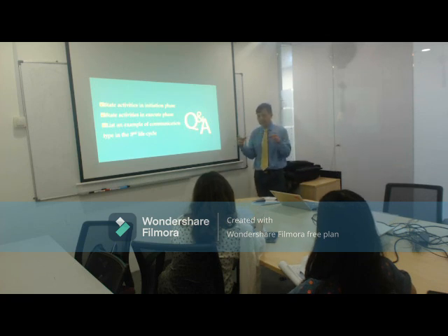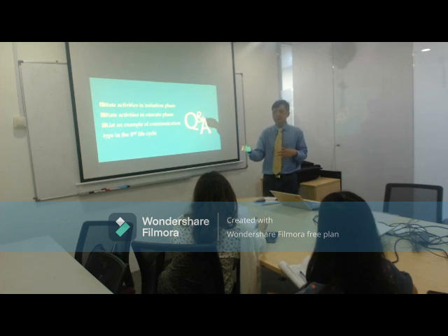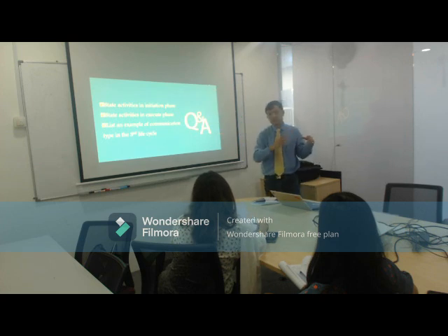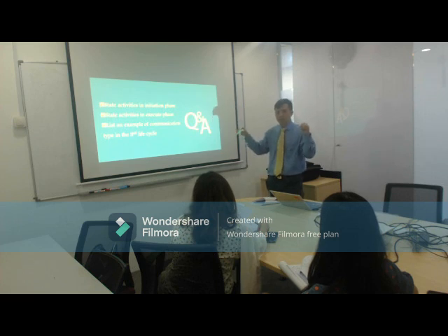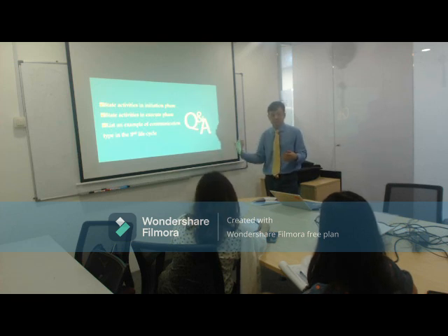So another area is that we may need to be able to communicate with these agencies to say that I want to get this permit. Then the agencies will list out for you the list of things that you need to provide them. Okay? For example, drainage and irrigation. They don't want you to start building a bridge and after that cause a landslide in the place. They don't want you to build a bridge where after a few times you use it, one side will collapse. Yeah? They don't want you to build a bridge where nobody is going to use it. Why? Because the other side is not connected to people who can access the bridge. Right, so those are the examples of it.